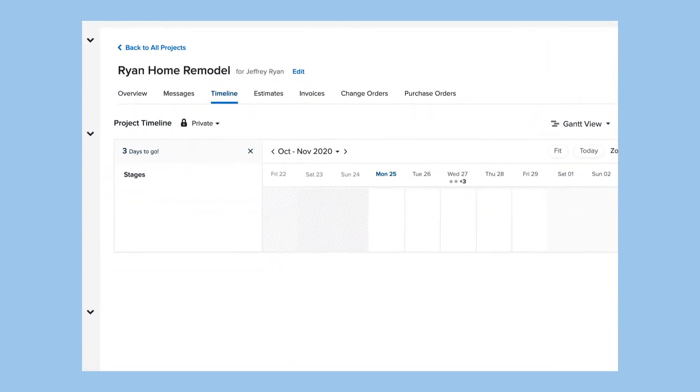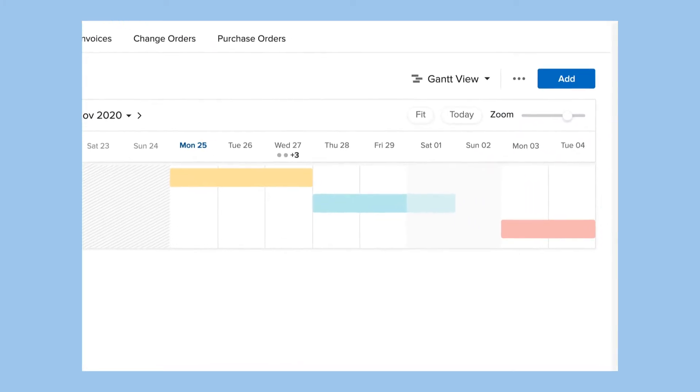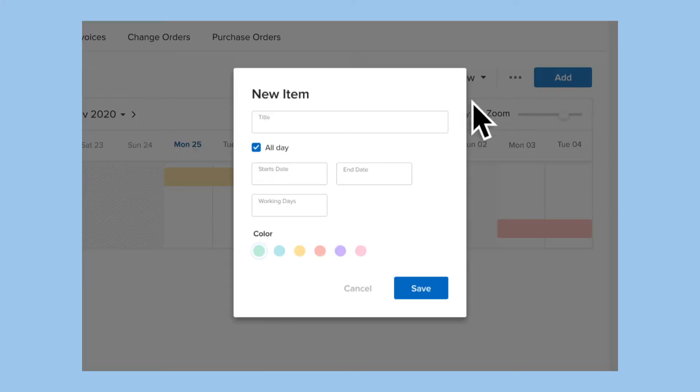To create a timeline for any project, just enter the project stages or activities you want to track or communicate along with the projected start and end dates.